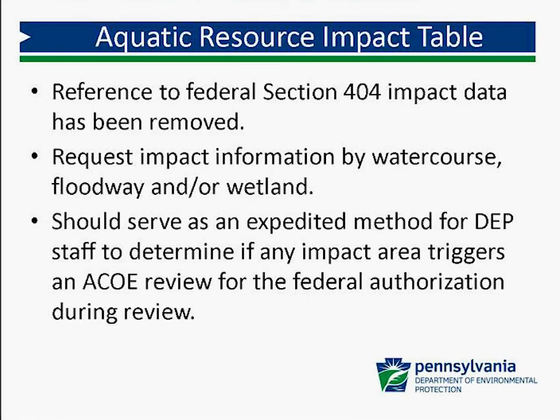On the Aquatic Resource Impact Table, reference to Federal Section 404 impact data has been removed. In the past, this has caused some confusion with clients submitting information with the wrong impact, since Chapter 105 regulates a wider, broader area than the Section 404 area.